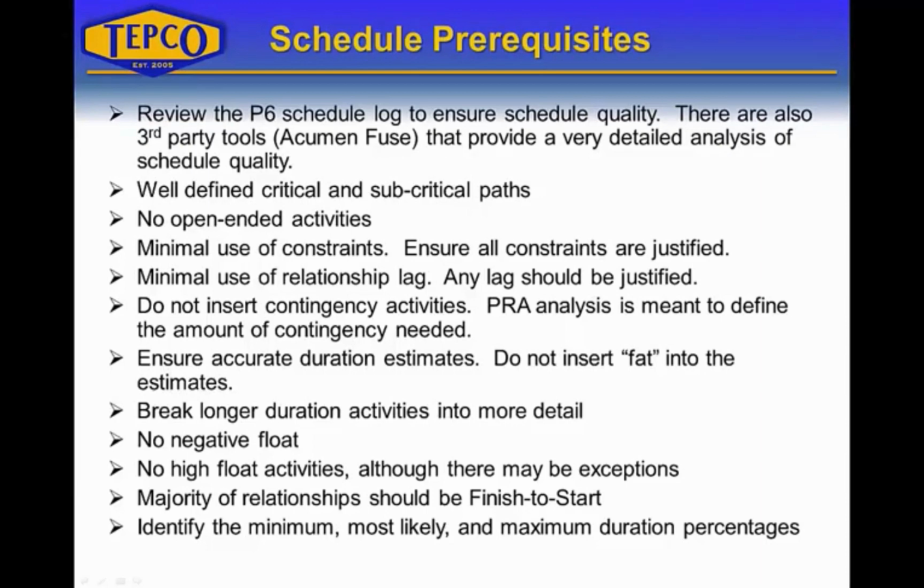High float activities should be looked at. There could be exceptions, but you don't want your activities running with too high a float. You may be leveling your plan, which would reduce the remaining float on them. Check out your high float activities and just make sure they're valid.